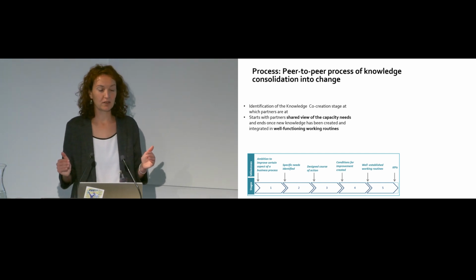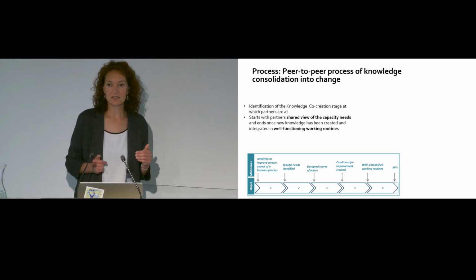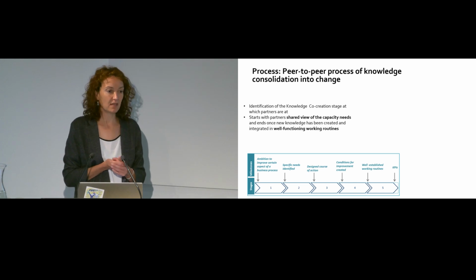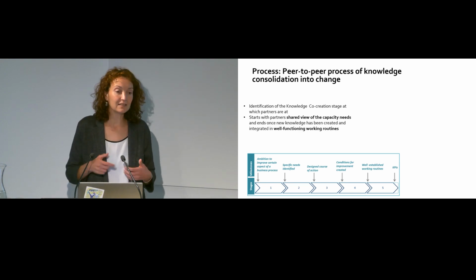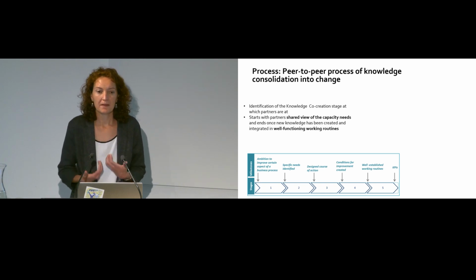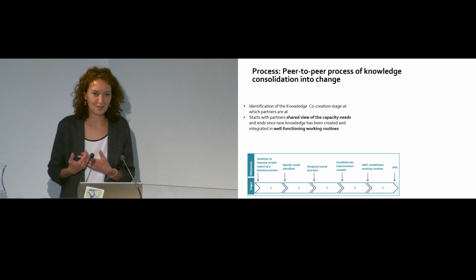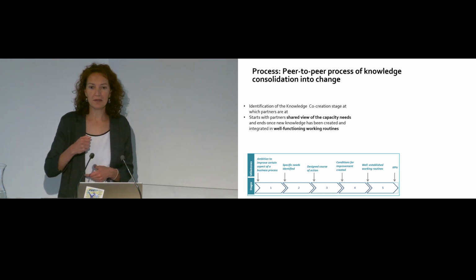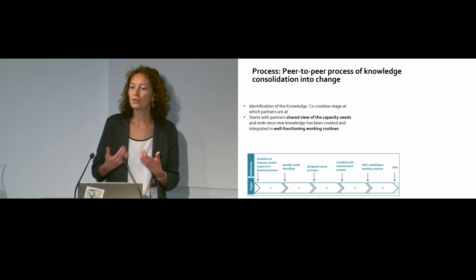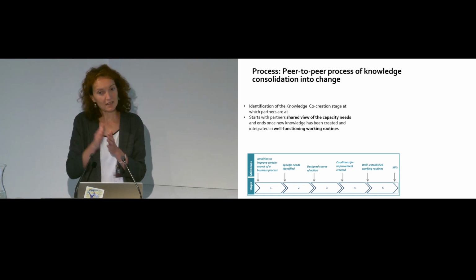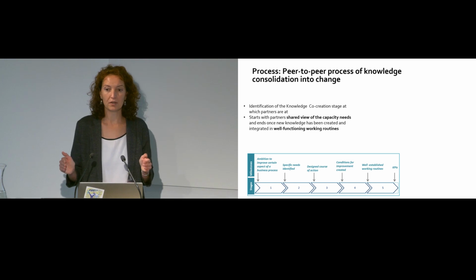And that's already very good progress within the utility. When you have been working together as partners and you've identified, okay, these are clearly our needs for this first year in this improvement or working area, which is asset management, that's already one step done together. Next milestone: individuals already have some knowledge, conditions are created for change, but change is not yet visible. You've done some trainings, you procured equipment, you managed to change an SOP that delineates how the process should work, but you don't see change yet. You are creating the conditions, but change is not there. That's another good step, another milestone.